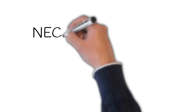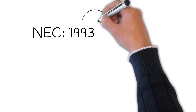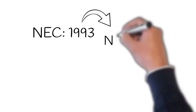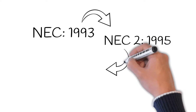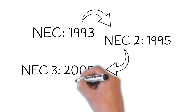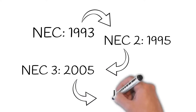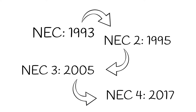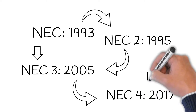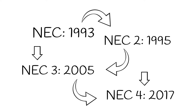The first edition of the NEC was released in 1993. Subsequently, it evolved into NEC 2 in 1995, NEC 3 in 2005, and most recently NEC 4 in 2017. At the moment of writing this article, most contracts are currently procured under NEC 3. However, it's anticipated this will likely move into NEC 4 in the next couple of years.